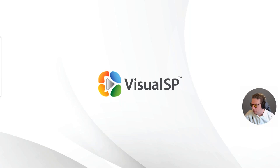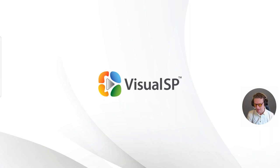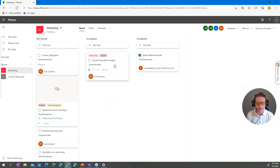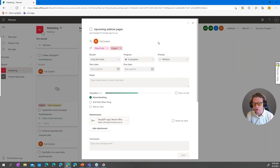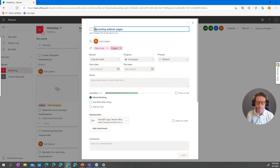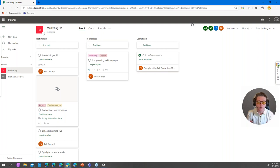A question from Jolene: Can you add custom fields to Planner? Great question — the answer is no, and I think that's intentional. Their goal is to keep Planner as simple as possible. Your ways to customize are buckets and labels. You can create as many buckets as you want and rename label colors. You can also come up with a naming scheme in your task titles — like the point estimate format — to encode additional information, similar to how you'd use different colored post-it notes on an agile wall.